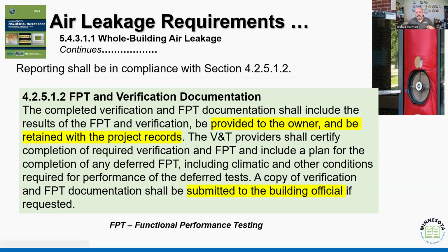Now remember, driving back to that requirement, this information has to be retained and submitted to the building official. Because again, what we're expecting is that we're going to have multiple layers of verification. It's one of those trust but verify kind of moments, right?